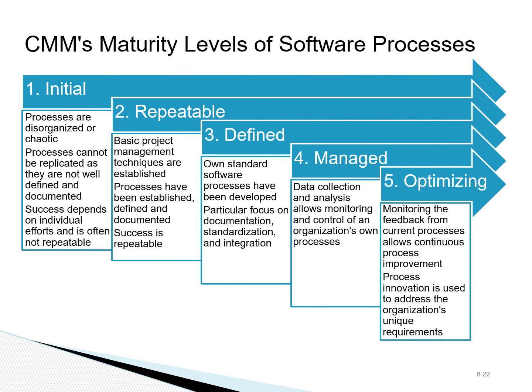One of the quality frameworks that was developed by Carnegie Mellon University with the support of the federal government is the capability maturity model. This model measures the quality maturity of an organization at 5 levels. The initial level is where there are no consistent processes and the success of the project depends greatly on the individual's ability and skills of the project manager.